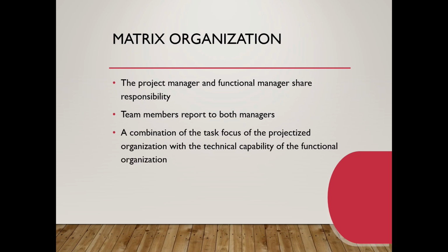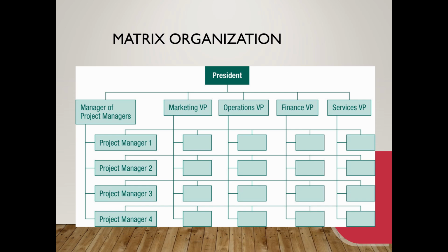Now, moving on to the matrix structure. Matrix structure is where the project is run by a core team dedicated to the project. Here you onboard functional team members at the right time in the project. It comes with advantages like functional expertise. We will have the right mix of project leadership and functional expertise. Functional experts are consulted in decision making. Before taking any decisions, they are consulted. Operationalization of the project is easier, and there is some accountability in operationalization. No compromise is made on speed and focus of decision making.